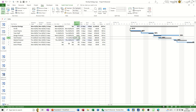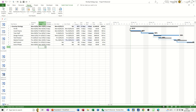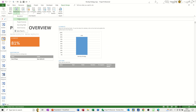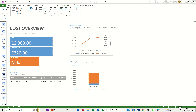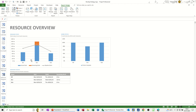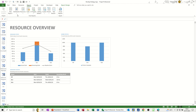While you're doing all of this, this is where the report side of Project kicks in. This project is nearly complete — I'm at 81%. If I go up to the Report tab and show you some of the reports, these are the preset ones. If I go to Project Overview it tells you you're 81% complete and what's coming up next. Under Dashboard you've got Cost Overview which gives you a bit more information. Under Resources you've got Overallocated Resources and Resource Overview — remaining work for Ben and you can see the baseline work there. These are all very useful reports.